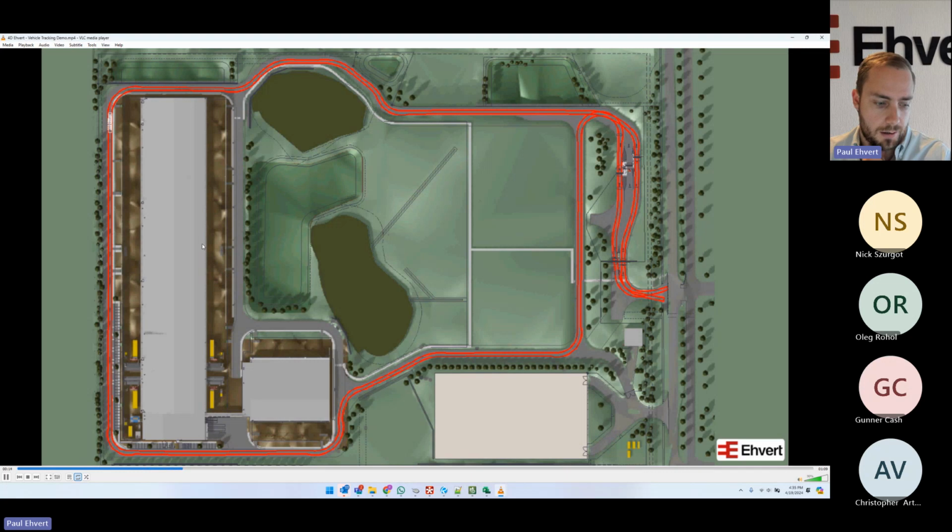This was an example here, where they designed their initial ring road and you can see that there isn't enough turn radius to get around this corner of the site. Is that something we should be looking into, or has that been done by, I don't know, WGI or the Clune team?